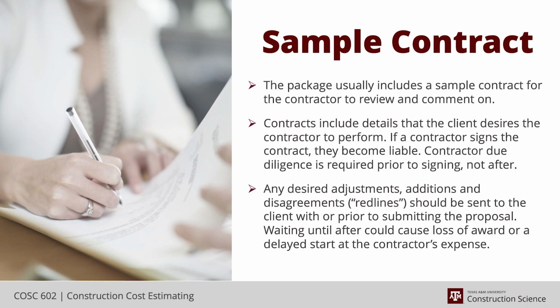In other cases, we still received the award, but it took an additional 2 to 3 weeks to work through the redlines. The problem with that is that the required mechanical completion date of the contract never moved. So now you have a 6-month job that only has 5 months and 1 week left to execute.